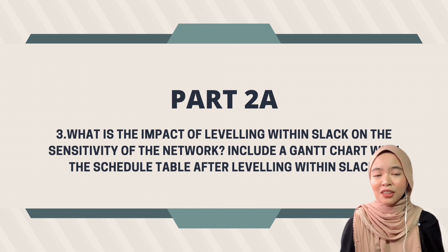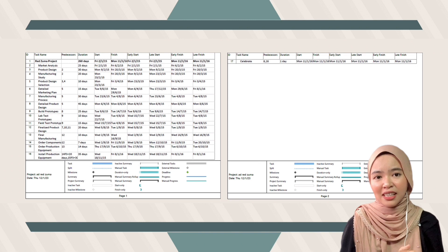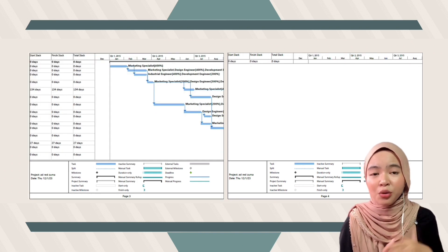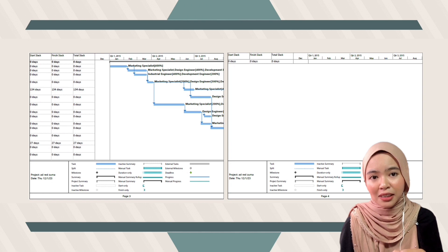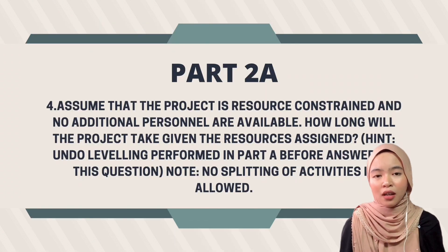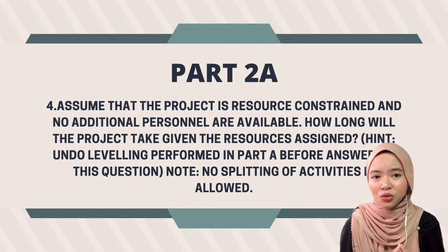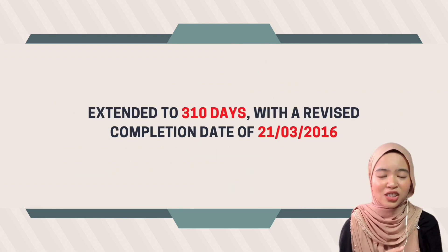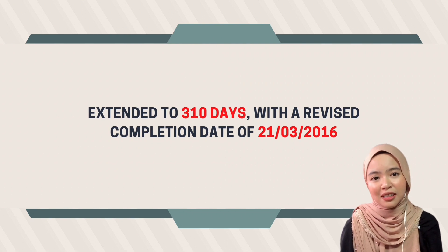The leveling affected the project schedule since it added additional routes and cut down the overall number of slack days, making the network more sensitive due to reduced flexibility. Figures in the slides illustrate the project Gantt chart and schedule timetable after leveling within slack. If we assume the project is resource-constrained with no additional personnel available, the project time frame will need to be extended to 310 days, with a revised completion date of 21st March 2016.